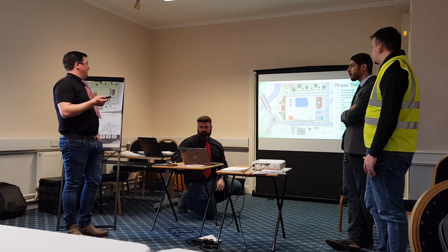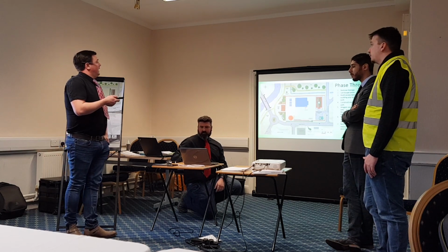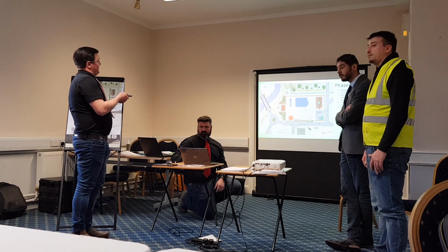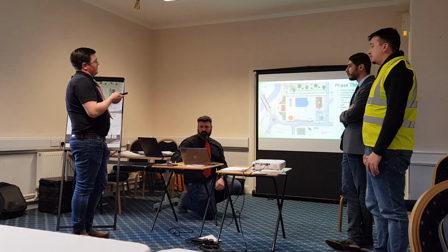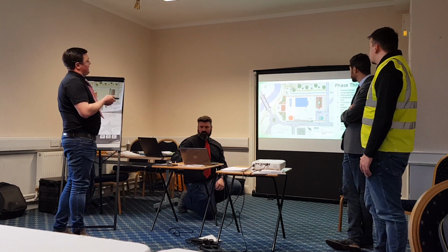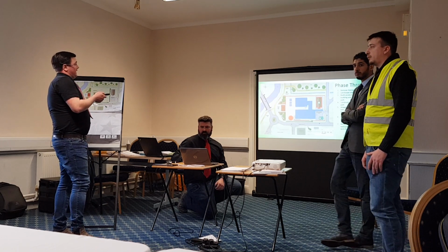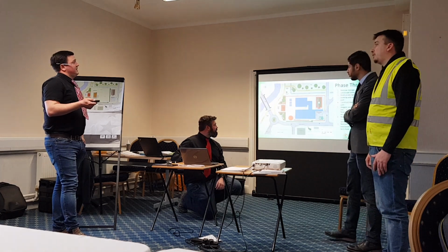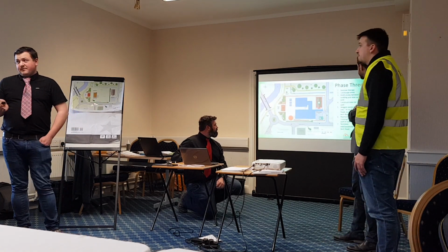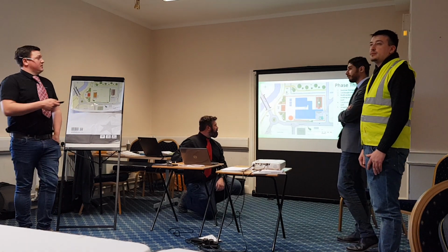Phase 3, we're going to have to remove all the storage. We're going to obviously landscape the areas that have been disturbed. We need to build a new access between the new building and the new car park. Construct the new car park. Wagon access now will have to change. This is why again we've had to split it into 3 phases so we can build through the site.